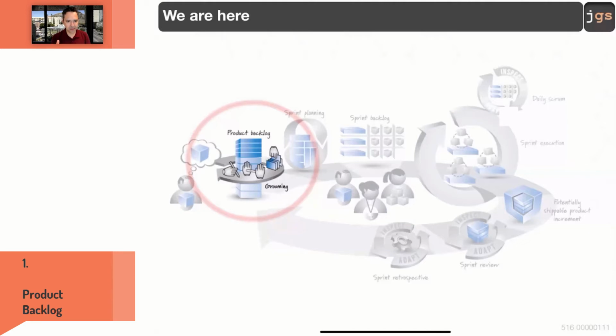Obviously, the first thing that you put there, and we already reviewed, is your stories, the ones that you review, complete and validate with the INVEST principles, but also the epics. The only difference: the epics, the ones that are still being reviewed and not split into small tasks, you put down low, like things that are going to be done at some point. The stories, the ones that are ready to go, should have priority at the top of the stack, because a programmer can take one of those and start working.